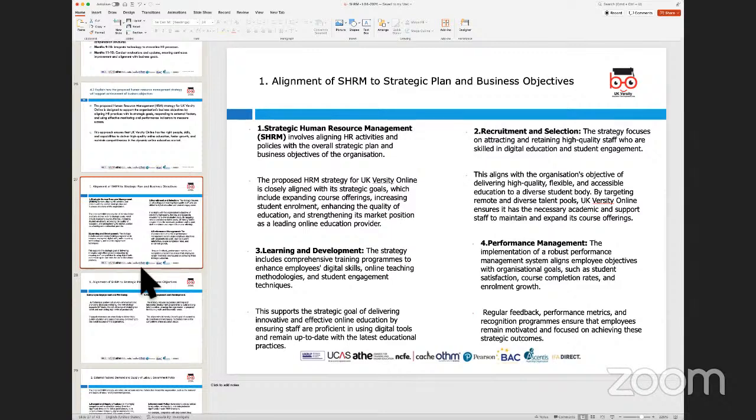So their role and function would start with recruitment, maybe at the same time as the fitting in the location is happening. That would give them a couple of weeks for the staff to join and then start training and development in another outlet to understand how the operations have to be run. Different people will undergo different sorts of training. And by the time this outlet starts, from day one, you'll have staff who are trained. They've had hands-on experience of working within various tills and terminals and various aspects of it, and that store would start its operation without a hitch.